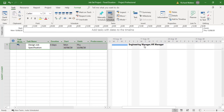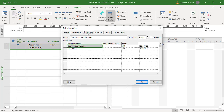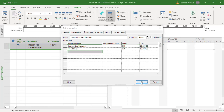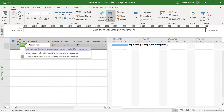We're now going to change the resource allocation and again take the HR manager down to 20% — setting resources to 0.20. This time the duration didn't increase, so it allowed us to change the resource, but because we fixed the duration it has maintained itself. There's a message here which we can review — the second option, which is the default in this case, changes the amount of work but keeps the same duration, which is what's happened because it's a fixed duration.